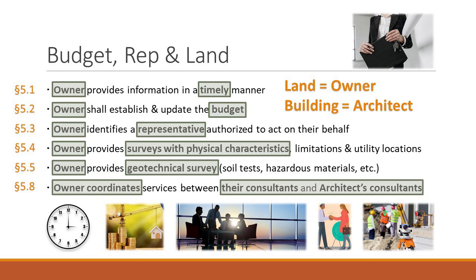5.5. The owner shall furnish services of geotech engineers. So if you remember back in our basic services for the architect, the architectural services include mechanical engineering, electrical engineering, and structural engineering. It doesn't include civil, and it doesn't include geotech. So geotech, again, the way to kind of think about it is in conjunction